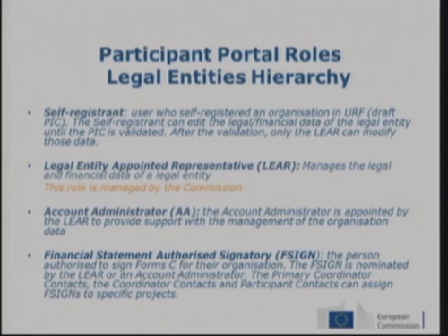Again, you have here the different items for the project: work packages, deliverables, milestones. As I was saying, NEF is somehow intelligent, but it's not able to check the consistency between the manpower and work packages, so that is not there. Legal data is something that cannot be edited. It's there, but it comes from the validation service, so you cannot edit it.